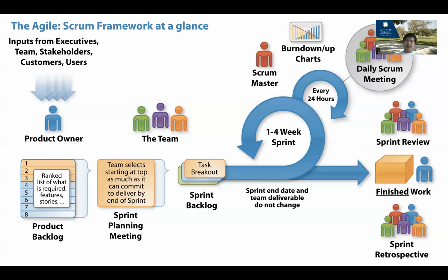All right. And then I'm going to decide what I want to work on for each cycle, right? Because the time is limited. I can't finish the whole system, but I'm going to start from the most important ones, the highest priority, and start work on that because I need to deliver those first. So before every single cycle, we need to plan and decide what we want to work on, and then we pick those features as our plan, and then we start our cycle.